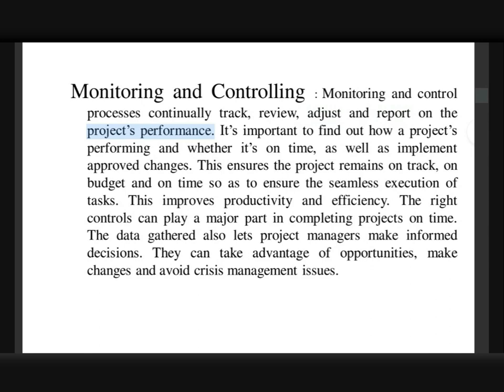a very important role. For example, one particular manufacturing process requires 10 days, and that 10 days of work is completed in, say, 5 days, and all the material is now ready. But now we have the problem of where to keep that material. For 5 days we will have a problem of where to keep that material. So all these things, the project team needs to pay attention to.